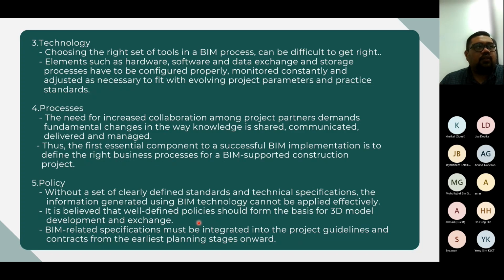It's good, but unfortunately when it goes to the construction stage, the contractor is not with the BIM, so they go for the conventional approach, because the client or the owner is not strict on the BIM implementation for the construction stage. So that's basically the waste stage.